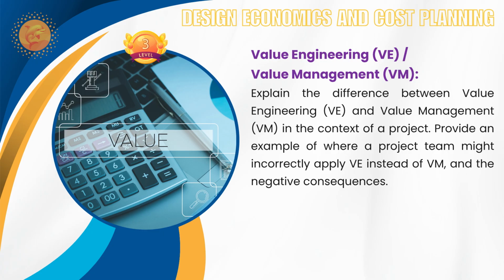Yes, sir. So when we are looking into this, particularly the value management is a proactive process. Value engineering is reactive. So you get into a specific situation for a specific development, and you want to find alternative construction method or material or different design solutions, then only we will apply value engineering.